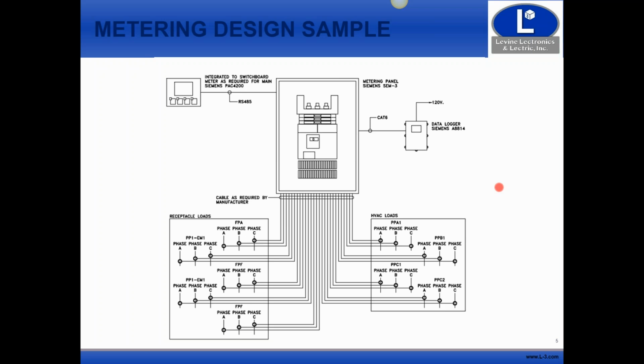We've run into that before, where we're scrambling at the last minute to get something in and operational. Usually it falls under the panel manufacturer, whoever's providing the electrical panels and the switchboard. They put some money in there for it, and then at the end, the contractor's saying, all right, I need it to work, and now we're scrambling to put something in to make it work.